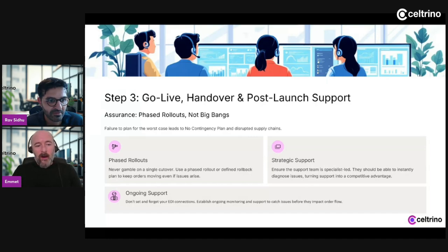Go live handover. I'd say the most common problem here is that initially, when you test with a customer, you're just using a small sample of invoices or products or services so that the testing phase can go smoothly. And once you go live, you can get a lot of data issues from your system. An example might be invalid barcodes on your products, for example. That will cause an invoice to be rejected by Tesco or most other buyers or multiples.